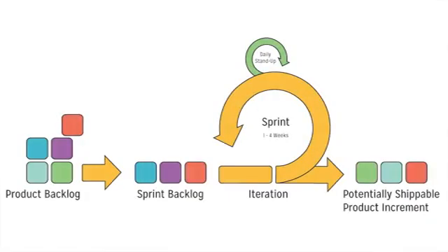Another Scrum event is a sprint. A sprint is a development phase of a specific amount of time in which a working prototype is delivered to the client. These sprints are also time-boxed, but more strictly enforced. A sprint lasts 1 month or less, typically 1 or 2 weeks. Once your Scrum team specifies the length of your sprints, they must consistently stay that length for the entire development. Sprints cannot be made longer or shorter.